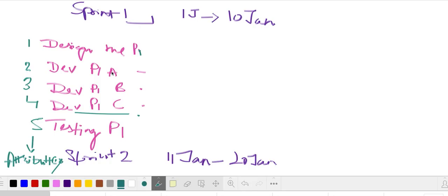There's one more thing you have to know when defining activities and sequencing them. We give them a unique number. When we are sequencing in every single project, you wouldn't see 1, 2, 3, 4. Suppose the project name is Kio. So I would say it's Kio 1, Kio 2, because in one project there can be tons of activities.